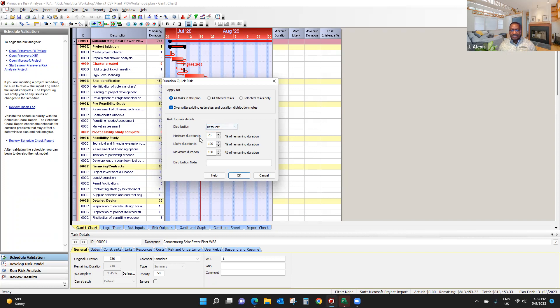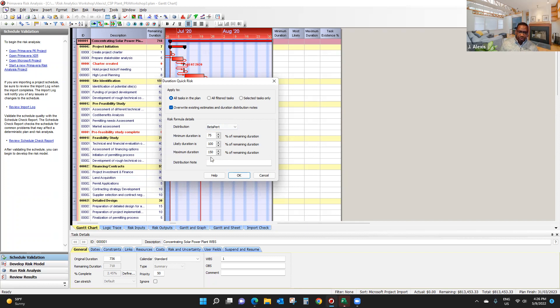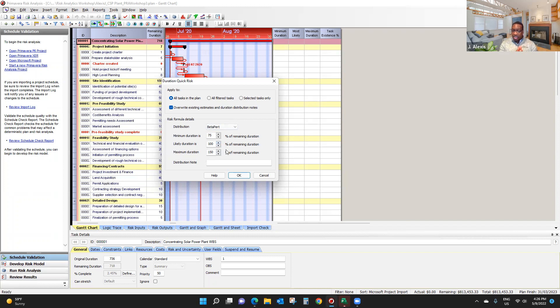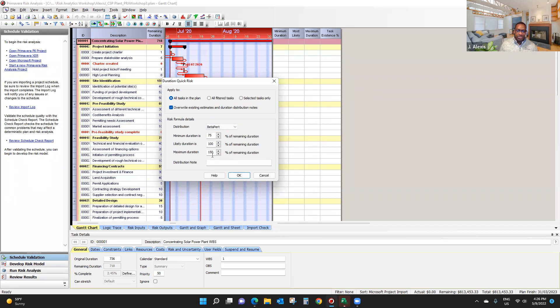And we're going to say the minimum duration is going to be 75% of the most likely duration. And the maximum duration will be 100% of the most likely duration. Note that you can actually change this information. If you feel a bit more pessimistic, you can also say, well, I think the maximum duration is going to be 200%. You can actually increase this.